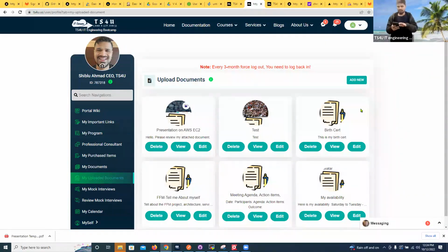Okay? So in the sprint planning, we only pull the user stories that are high priority or important. Prioritization happens two ways. The product owner makes the priority. Why? Because the product owner works with the business, with the software engineering lead, and with the Scrum master. So the product owner knows the priority. The software engineering team also knows the priority because they are technical people.